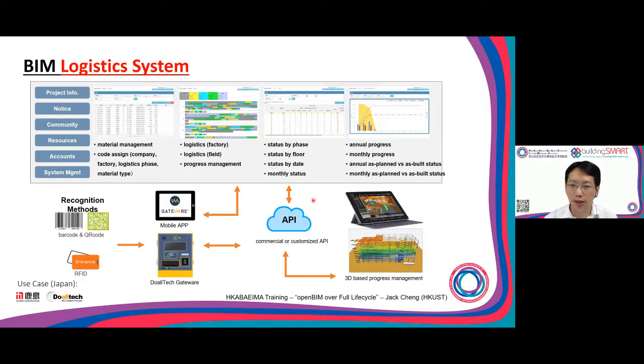And then with that, they also support mobile devices. That means maybe they can generate this kind of report daily. And then with a mobile phone, they can already get this information, evaluate that daily performance, and try to plan for the next day. And all this will be achieved by the BIM integrated information. And they also can link this with barcode, QR, RFID, etc. And this is how they try to manage the construction accordingly.